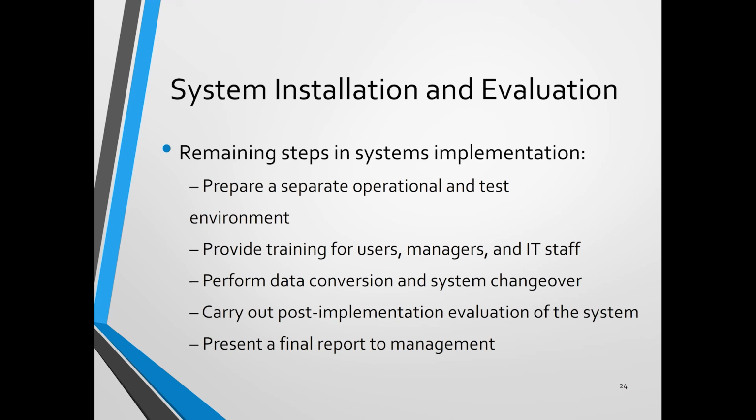If it's okay, you prepare the separate operational and test environments for the installation. Test here is for the installation. Then you provide training for users, managers and IT staff. As I told you, when we finish testing, the next step is the training. Users, managers and IT staff have to know how to use the system for their specific authorized modules. Then perform data conversion and system changeover. This one, as I told you, is not easy.